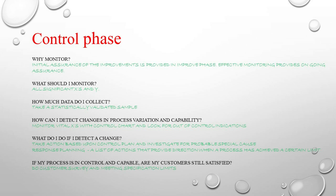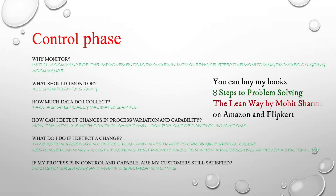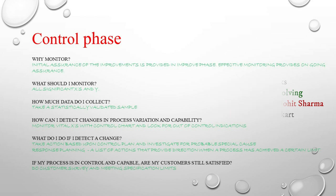What do we need to do if we detect something changing? We have already created a control plan, so we take actions based on that and investigate for probable special causes. There is also a response plan — if anything goes out of control, look at the response plan and take actions. If the process is in control and capable, check whether customers are still satisfied by doing a customer survey. If you understood the customer's problem statement at the beginning and resolved it, the customer will definitely be happy by the end of the control phase.